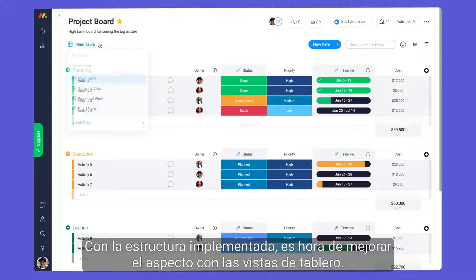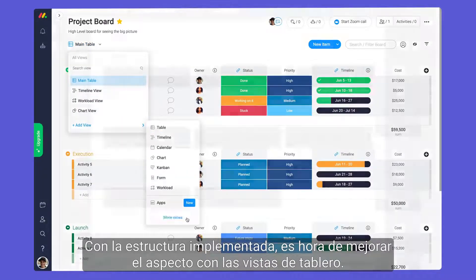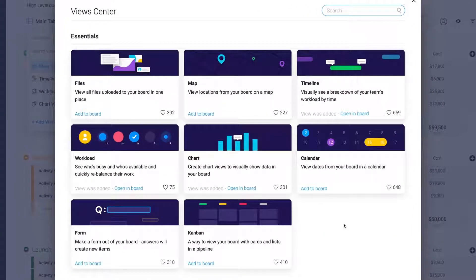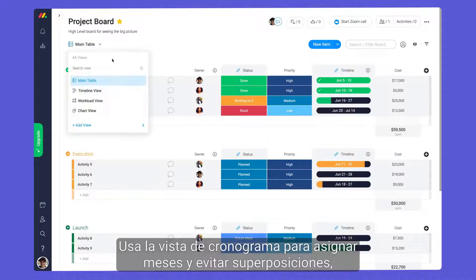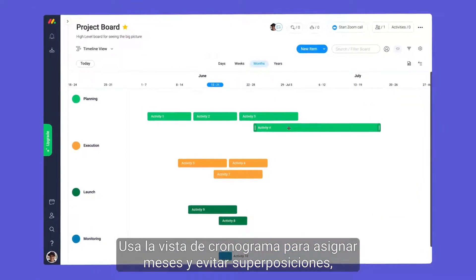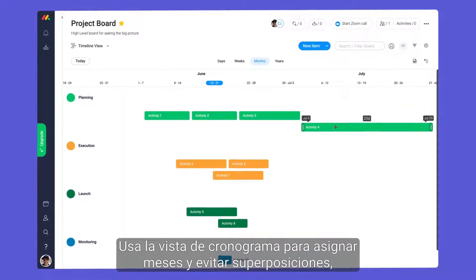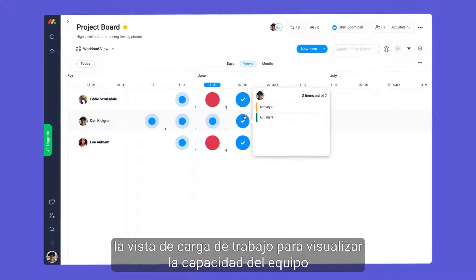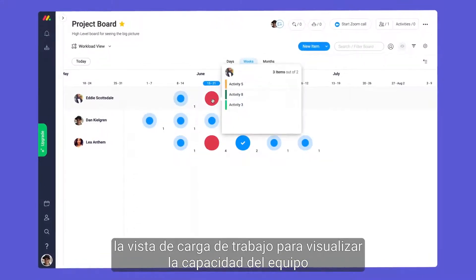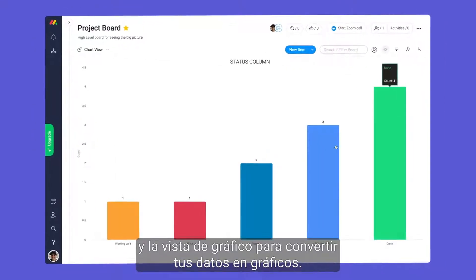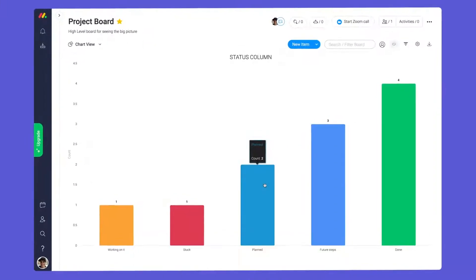With our structure in place, it's time to get visual with board views. Use the timeline view to map out each month and prevent overlap, the workload view to visualize your team's capacity, and chart views to convert your data to graphs.